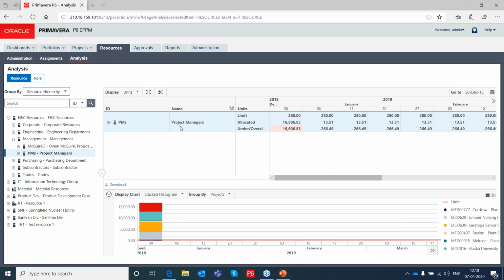Yes. Because of the different purposes of the different modules, Primavera itself has many other products. Like risk analysis does the complete work, whereas there is only a risk register available in EPPM. Same thing with this particular EVM also. There are a few things in EPPM, but the quantity based and other stuff, I guess, is probably going to be in Unifier.